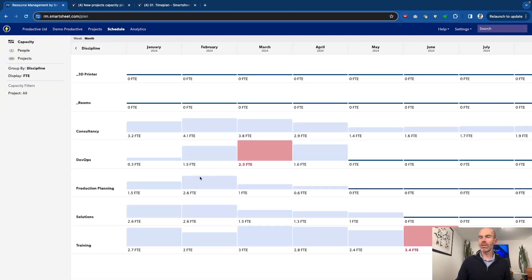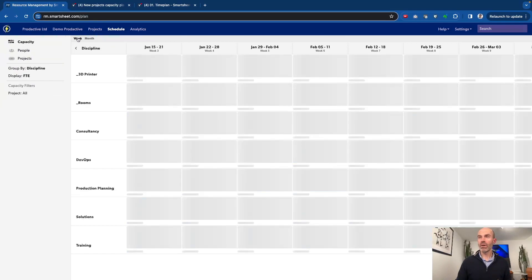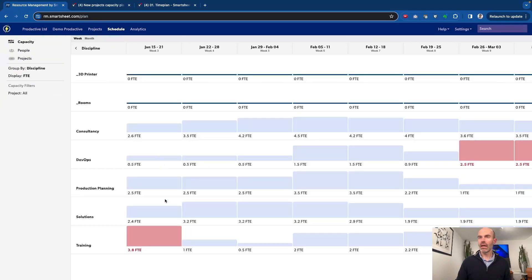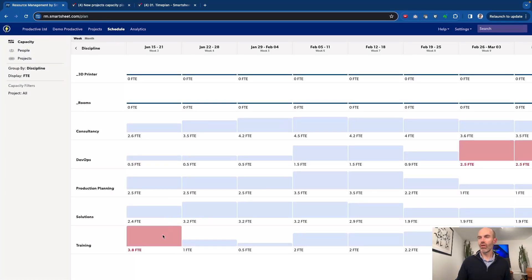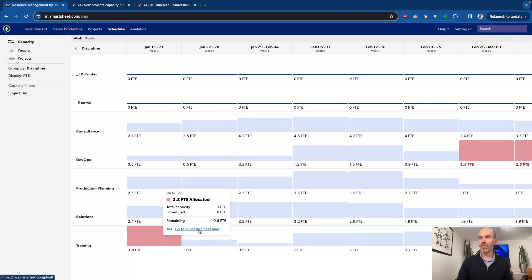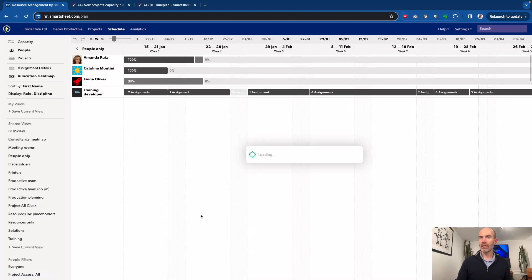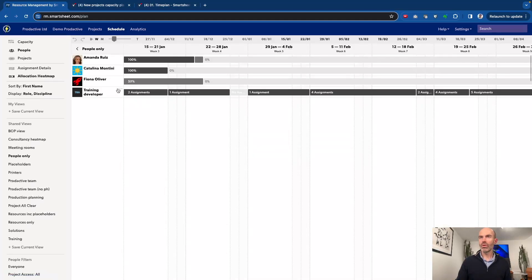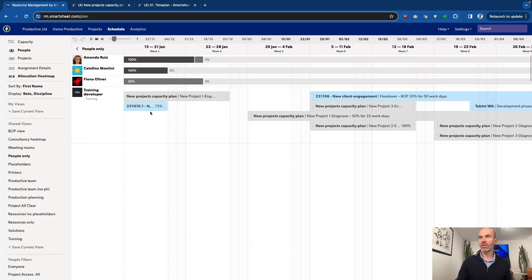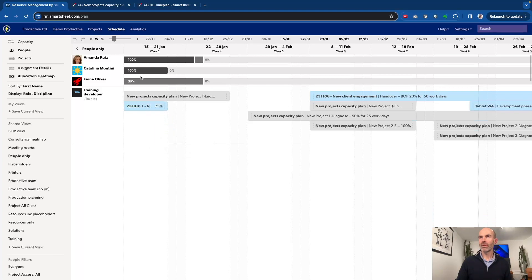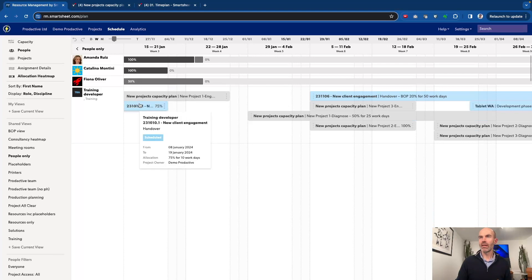We can see it's not looking so bad. Let's zoom in by week and just see what's the implication of this overall. We can see the training team, they're over-allocated. What's the cause of that? It's the new project capacity plan, and we can see that's 50% which is causing the problem. We know that the team, there's only capacity here for Fiona on that side.